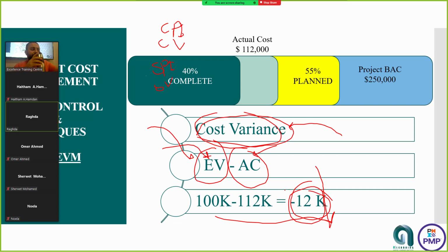use more resources. Extra resources. Great, perfect. So, are you going to use extra resources in this situation to make your life easier and finish faster? No, because we are running a cost overrun. Whether you are using extra resources or outsourcing or working overtime or whatever costs you money, definitely you will avoid this. You'll go to fast tracking, which is what?